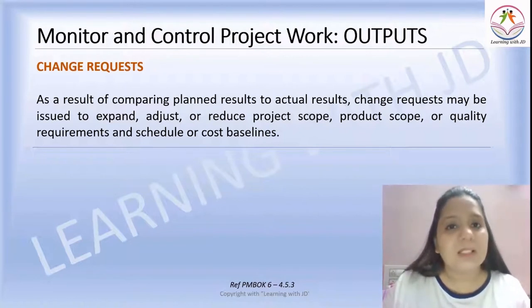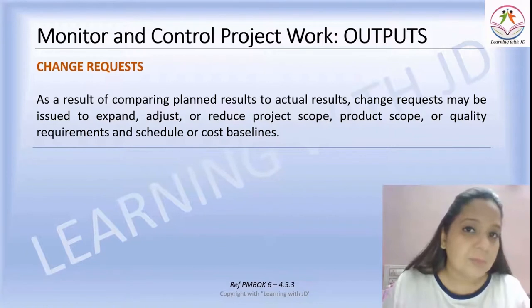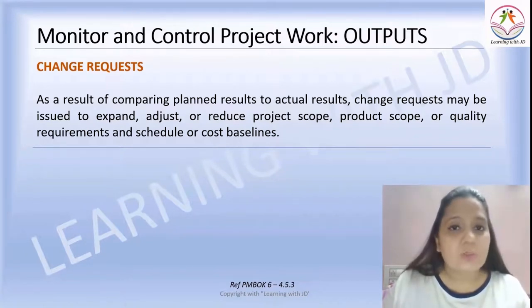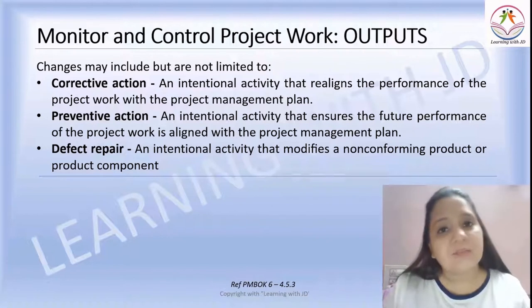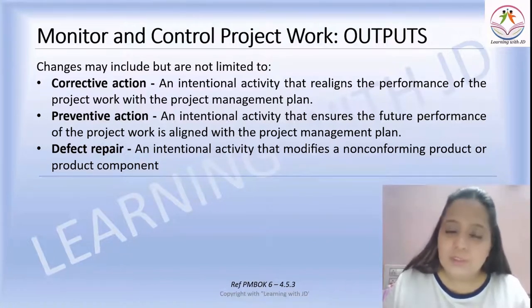Now, will this change request directly go to direct and manage project work and the work will be executed? No. These change requests will go to perform integrated change control, PICC. Only after that will the work begin. Changes may include corrective action, preventive action, or defect repair. A corrective action is an intentional activity that realigns the performance of the project work with the project management plan. Understand, it is an intentional activity, it is done purposely. Preventive action is an intentional activity that ensures the future performance of the project work is aligned with the project management plan.